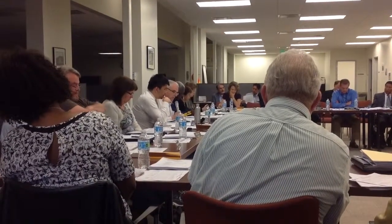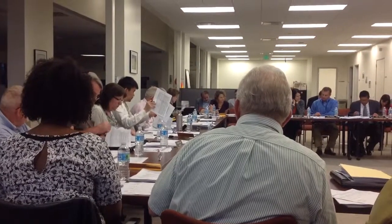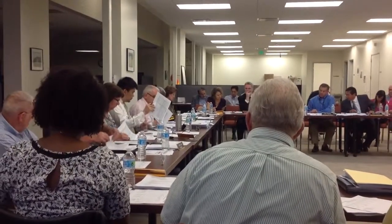But this one hurried out without any constructability review, in my judgment, my opinion. And it then became vulnerable to 126 change orders. And look at those, 76 of them were reason code 3, which just sounds so onerous. It sounds like just full of mistakes. Design deficiency, parentheses, errors and omissions. I say, wow, we ought to pound the desk and get somebody's butt for that.